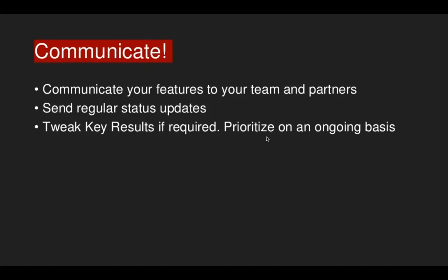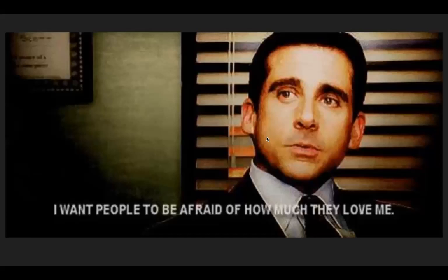And this allows you to prioritize and send regular status updates, so you don't overdo it. I think bi-weekly is fine. Very short, no more than 2 pages. So at the end of the month you have at least 2 of them, and then you summarize it. Next month, same thing. By the end of the quarter, you have a pretty comprehensive report with charts and all the data to support it. When your VP sees it, he's able to talk to the senior VP or head of product, and they're like, wow. You make them look good. They'll also want to keep you around and pay you the big bucks.